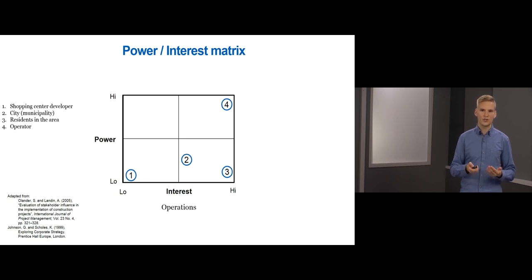In operations, the shopping center developer has handed over the project's end product to the operator and can be considered to have low interest and power to influence decisions concerning operations—unless developer and operator have some kind of maintenance contract, but let's assume for the sake of this example that they do not have such a deal.